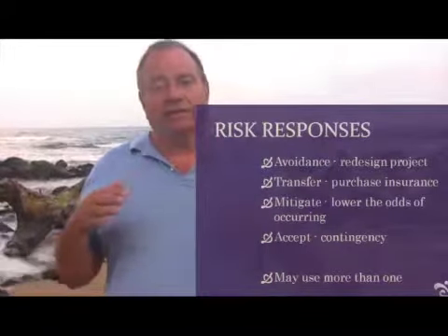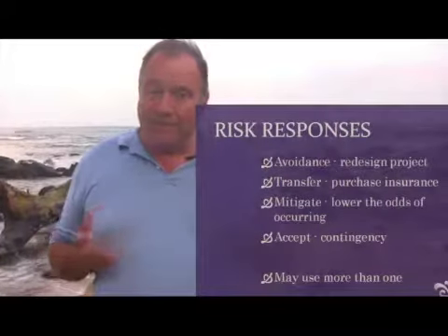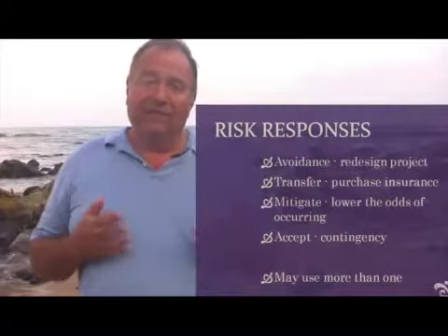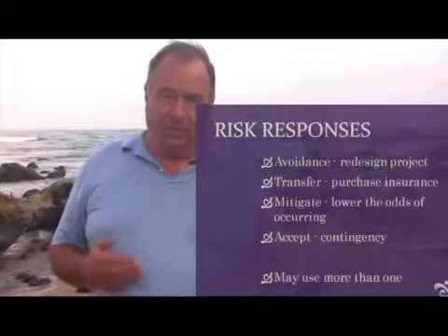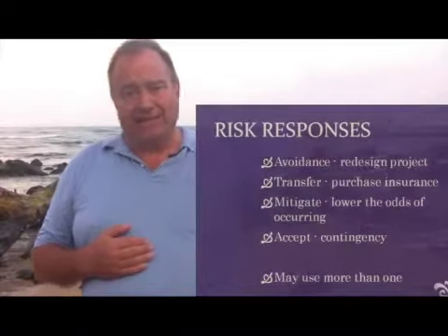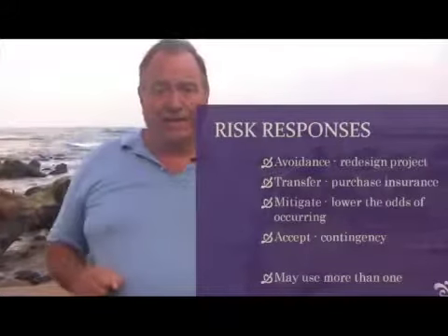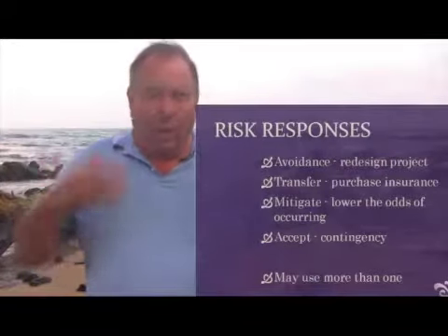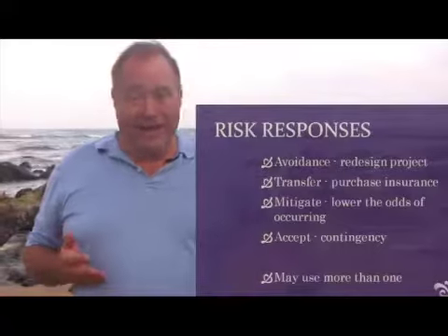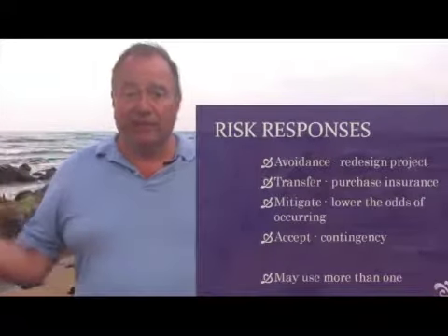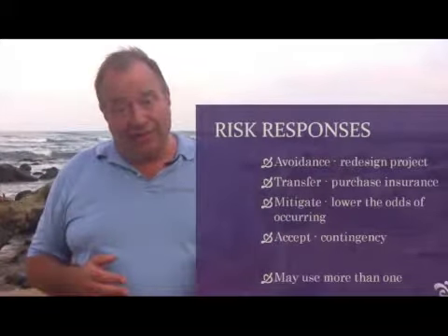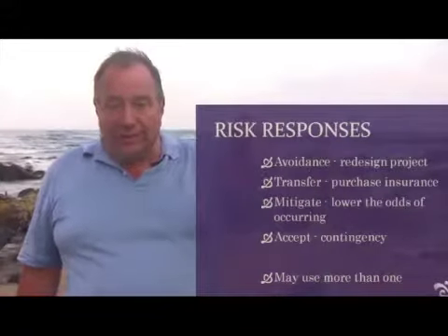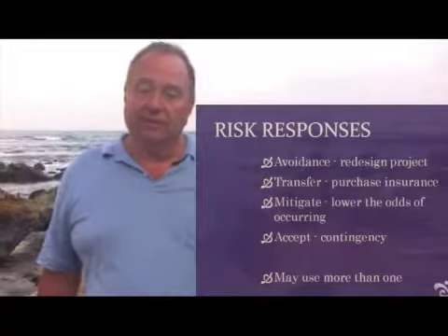One is we can use risk avoidance, and that's where we redesign the project to get rid of the risk. If, as an example, we're real concerned about our database analyst or our concrete engineer quitting and moving out of state in the middle of the project, well, one of the ways we might avoid that risk is to hire that specialty in-house instead of contracting outside for it. And that redesign would avoid the risk in its entirety. So that's our first strategy, is to redesign the project to get rid of the event that is causing the risk.